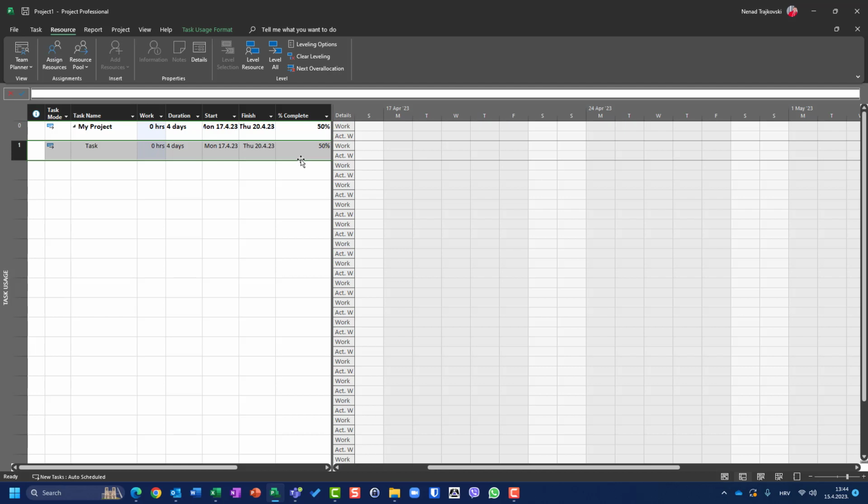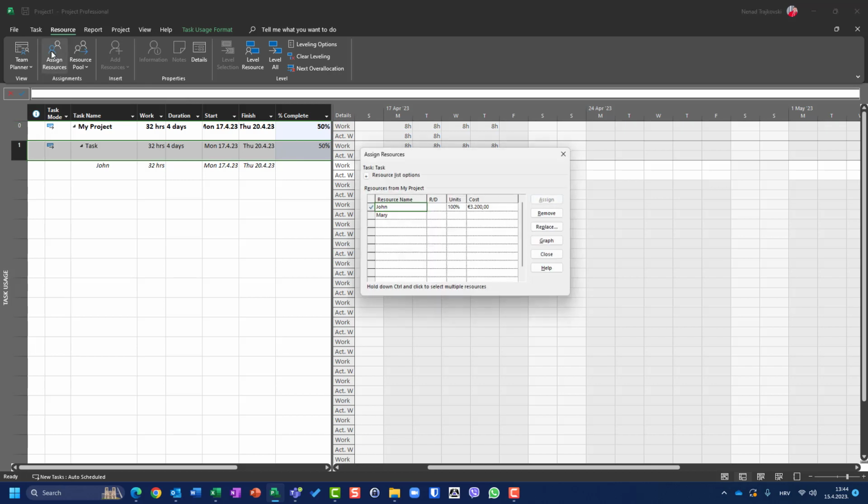Why shouldn't you remove the resource? Because John worked 16 hours, no matter if he left the company after that. Who cares? Now, let's undo it. What can I do? I can replace him for the rest of the work with Mary. And that's what I'm going to do.